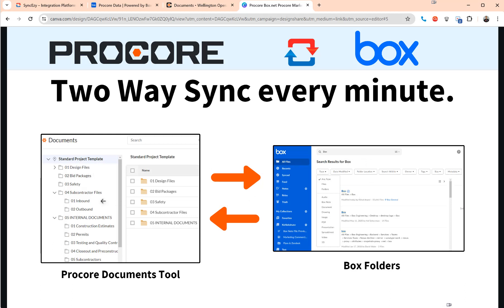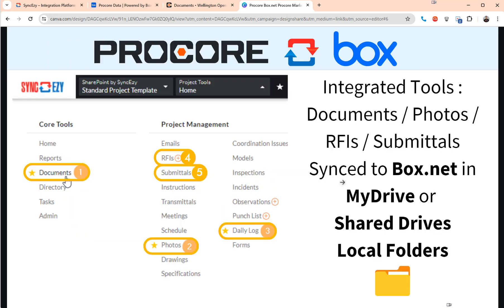With the documents and photos it's a full two-way sync. With RFIs and submittals it is a one-way sync. So for documents and photos you can actually add data in Box and that will go back to Procore. For other things where you have RFIs and submittals, these are more a one-way sync where you add the data in Procore and they go as a PDF to Box.